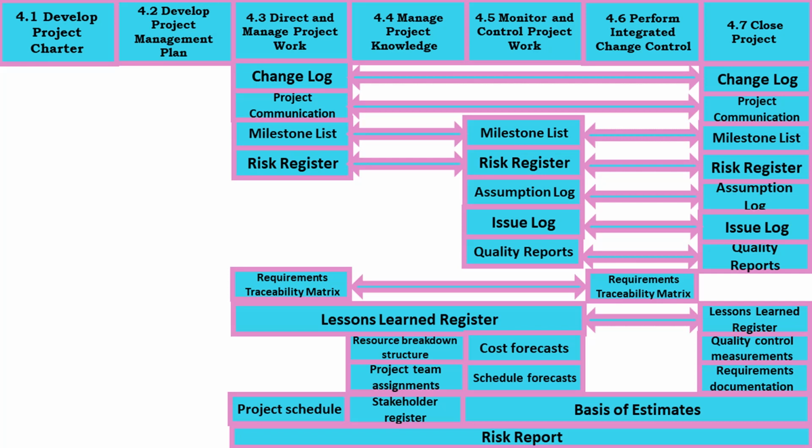Work performance information. To become work performance information, the work performance data are compared with the project management plan components. Performance data are collected during the project through the controlling processes and compared to the plan and other variables to provide a context for work performance.